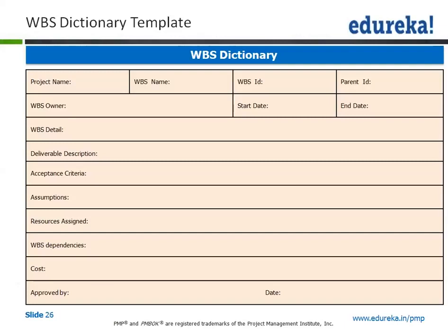No. This template will be going in and out of various processes, and this template would also become an input to the project time management process, wherein we would be estimating the resources and the durations, and those estimations would come in here. And finally, that would be fed back to the cost so that we are able to calculate my total cost of the project.